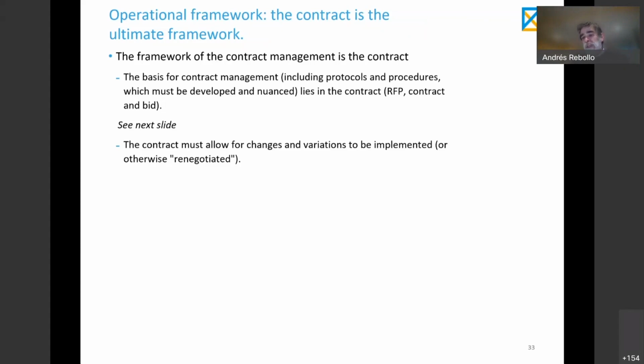No? So the Spanish government was, in that sense, as many other governments, accountable and proactive, and decided to provide some compensation to share part of the impact. There was a need to create a bill, a decree. Otherwise, it could not be possible to implement the variation in the contract to accommodate a compensation and sharing the consequences of COVID. That is an example of renegotiation, okay? So the idea here is, renegotiation, if it's needed, it's needed. It's not a bad thing by itself. But renegotiation creates problems with transparency. So we should try to avoid renegotiation to the extent that we can.